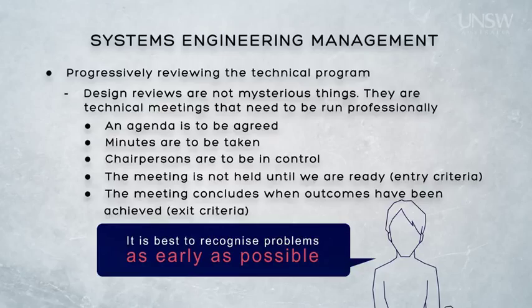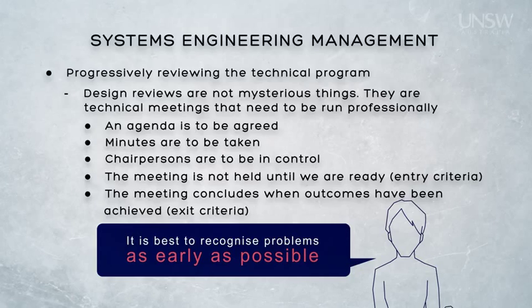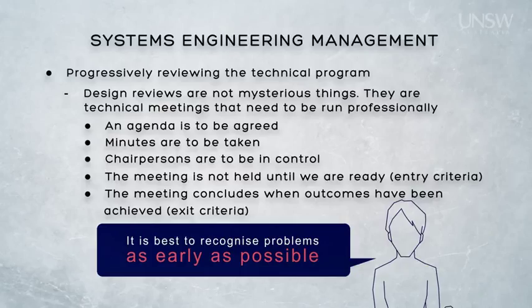Systems engineering planning must take account of the technical program and plan for these design reviews. Design reviews will take time, cost money and will involve a number of different people — that's why planning for them is important. The number and nature of technical reviews will be different for every single project, so we must think about every project as a unique undertaking. A risky project using developmental technology and involving large sums of money will be reviewed more thoroughly than a project at the other end of the spectrum.